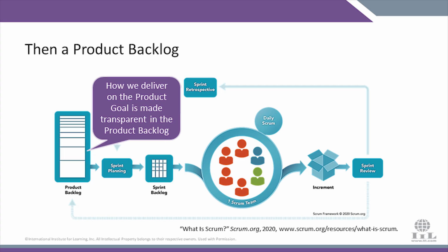That product goal lives in what we call the product backlog. That product backlog is a set of capabilities that we are managing in order to reach that product goal. The product backlog is a prioritized list. It might be, as it's demonstrated here, some smaller things, some bigger things. And as they come up in prioritization, hopefully scope down to work that we can accomplish within a day or less so that we're able to start to get that work and start moving forward.